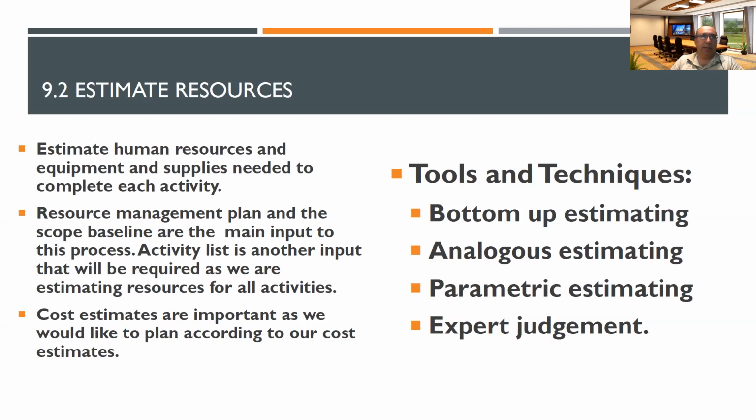And then what is analogous estimating? In that, from past projects, you can collect the data and estimate everything from all the past successful projects. Past successful similar projects, those which are similar. Yeah. Same objective, same activity. Yes, good, great. What is parametric?